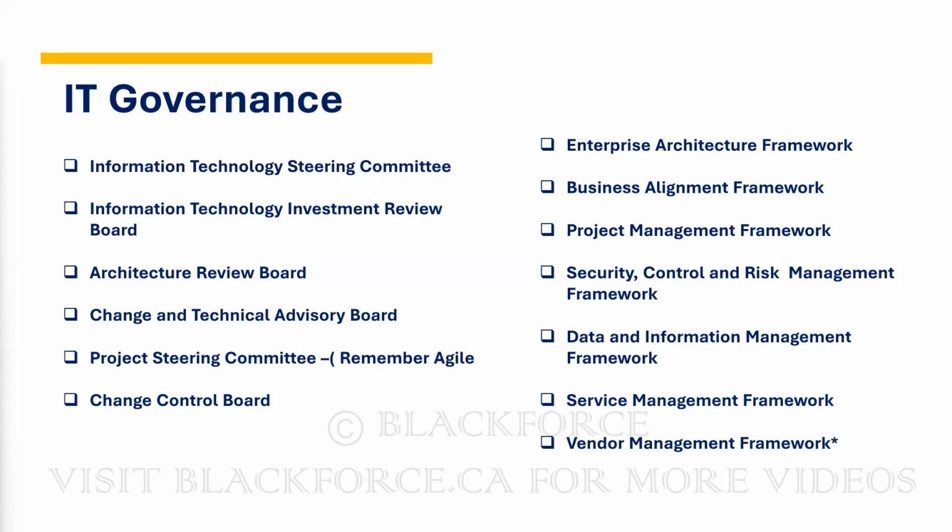So we have the project steering committee. For every project, there is a project steering committee, people that direct the project. If your project manager is having an issue on the project, they go to the project steering committee. If the consultant says we need to do this, and the project manager says, no, but we don't have approval for this, they go to the steering committee to get the approval. So that's how that works.